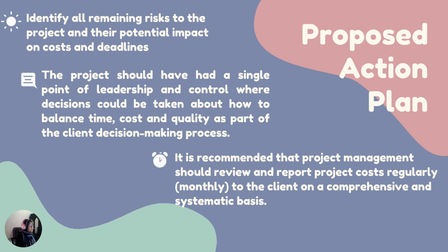So these are a few action plans that can be taken to avoid this problem. Firstly, the project management should instruct the construction manager and the cost consultants to prepare, as soon as practicable, a risk analysis, which should identify all remaining risks to the project and their potential impact on the cost and deadline, and quantify the most likely outcomes as well as best and worst cases. The result should be the basis for an action plan to manage the remaining risks.